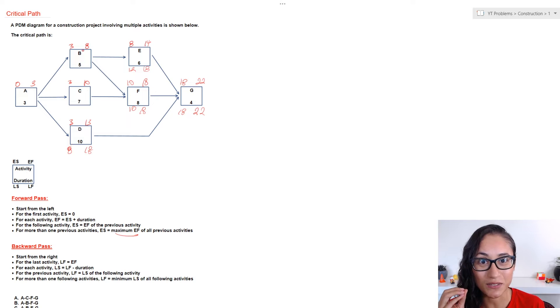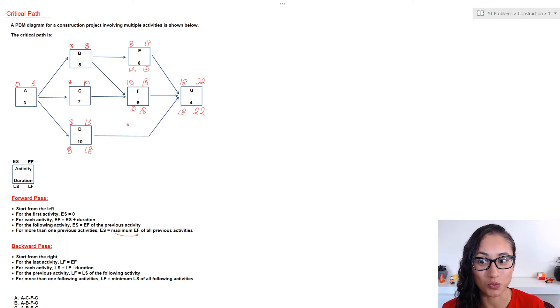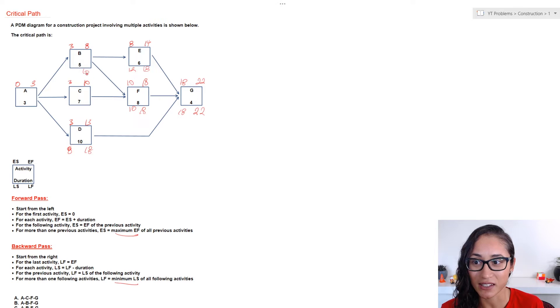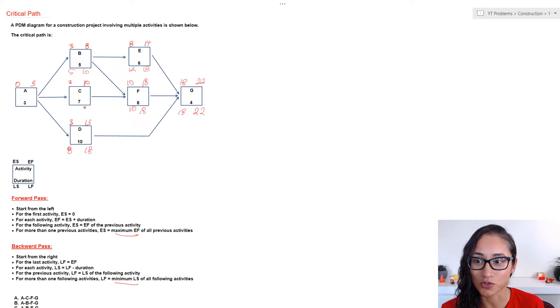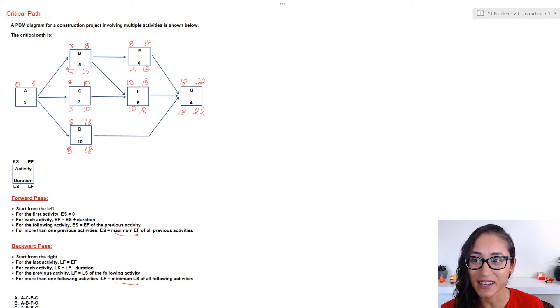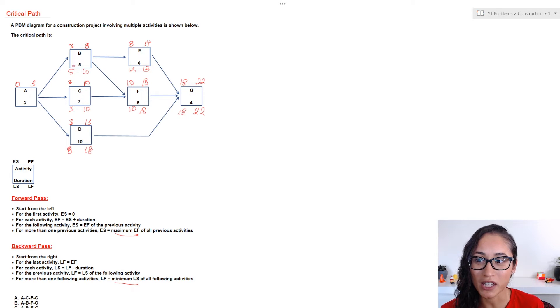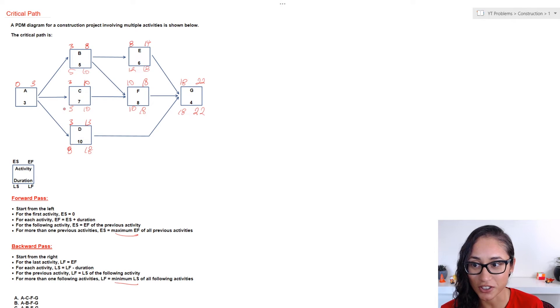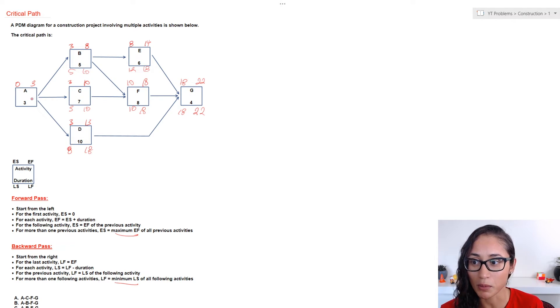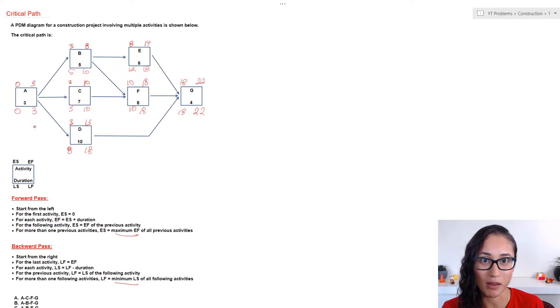Now, all these activities are going to have eighteen. It's the same concept as the forward pass. Now, to find the late start, all we got to do is late finish minus duration. Now, if we take a look at activity B, it's actually dependent on two activities, E and F. So, which one do we choose? Well, we go with the one that has the minimum late start. So, that means I have to go with the ten. So, ten minus five, that gives me five. Now, for activity C, it's only dependent on F. So, that's going to be easy. This is going to be equal to the same as this. So, I have ten, ten minus seven, we have three. And then, for activity A, again, it's dependent on three activities. So, we're going to go with the minimum late start, and that's activity C. So, that's three here. This is five, that's eight. So, three is actually the minimum. So, this here is going to be three. Now, three minus three gives us zero. So, that's how we do the PDM diagram.